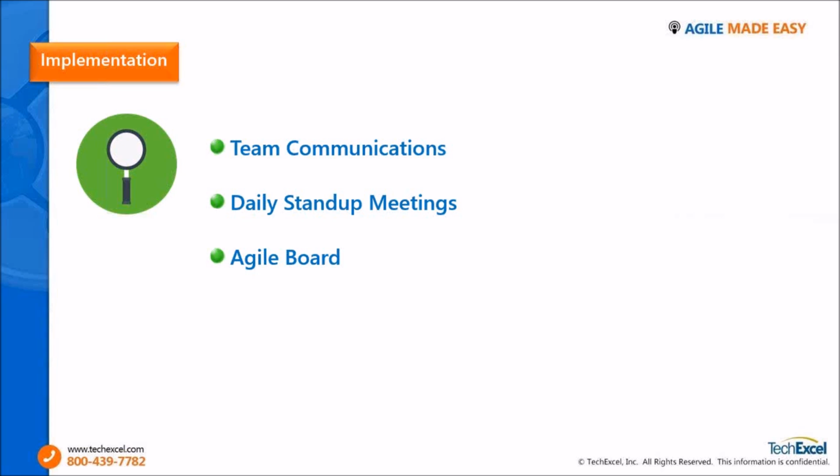Now the biggest benefit of having this meeting is that the developers and QA team start talking. The QA team knows exactly where this bug was reported, on which particular task, and who's the owner, so they can directly approach that specific developer and resolve any discrepancies between what was developed and what was being tested. All this can be done within the 15 to 20 minute time frame, and the team can keep moving forward, and the issues are resolved at the start of the day itself, rather than realizing there is an issue towards the end of the sprint.